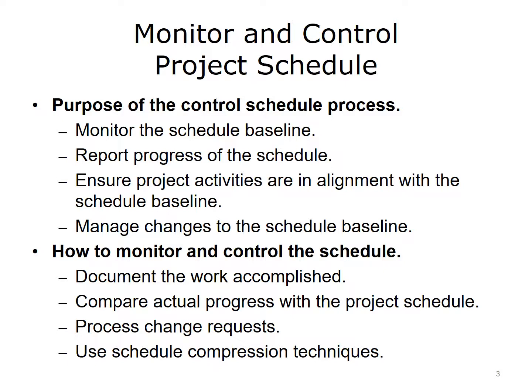Corrective actions may include bringing in more resources, also known as crashing, and doing more work in parallel, which is usually referred to as fast-tracking. These techniques may increase project costs and project risks. Preventive actions are recommended changes to the system or process that will prevent future schedule variances. You should issue regular reports to your stakeholders, apprising them of the project status. Your analysis of the project timetable and progress, along with corrective actions, keeps everyone informed and invested in the project.